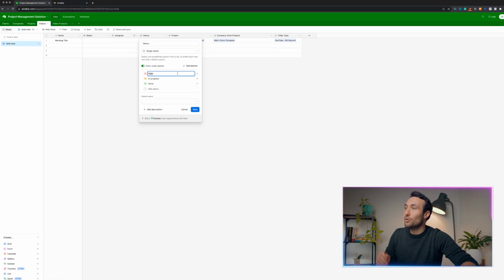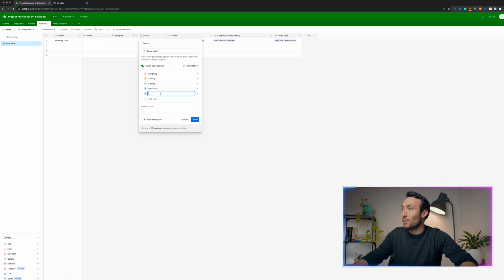So what we're going to do is we're going to change this around to, the first thing that happens is we're going to be doing scripting. After that, we're going to be doing filming. The next thing we might be doing is editing. The next thing might be revisions. The next thing that we might do is completed. There we go. All right, and the default option is in scripting. Again, it can only be one thing, right?